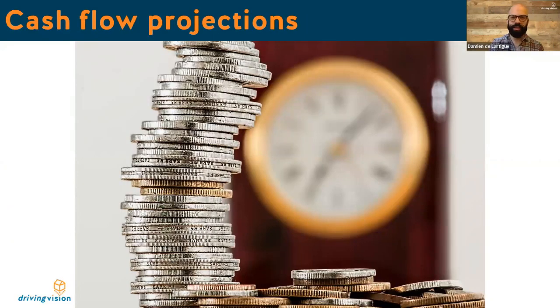Perform cash flow projections. Get in the habit of performing your cash flow projections. To create these forecasts, you'll need to work out how much work you'll complete in any given month, how much you'll be able to bill, and how much you'll be required to pay suppliers and subcontractors. Once the project is over, compare your projections with the actual receipts and expenditure to ensure future projections are more accurate. Integrate your accounting system with your program management software to automate the processing of forecasting.